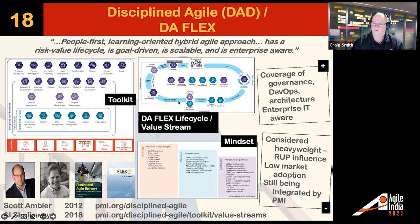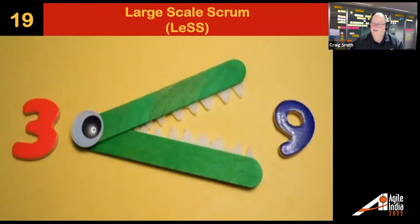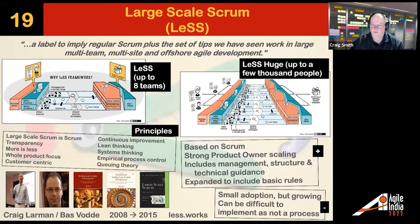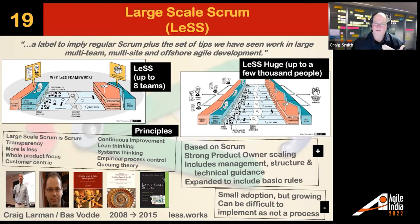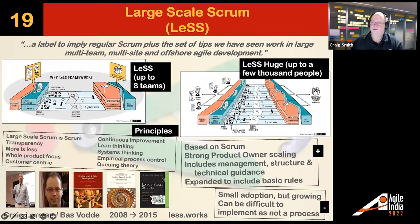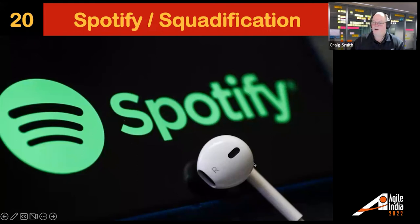LeSS — Large Scale Scrum — was built on work from the 2000s by Craig Larman and Bas Vodde. Back in the early days it was just their two books, Scaling Lean Agile Development, that people had for scaling guidance. It wasn't until 2015 when they really started to document Large Scale Scrum. It's about taking Scrum and scaling it — LeSS for up to eight teams and the rather silly-named LeSS Huge for up to a few thousand people. It's been very much around case studies rather than direct instruction, which is why people struggle with it.